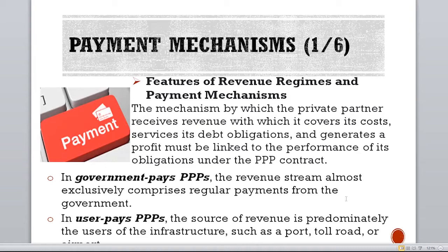That might be feasible because the government as of now does not have the 20 billion to put. So if government rather would achieve that project by putting an annual 1.3 billion, it frees up the remaining 18.7 billion that government would have staked. And they'll be using that 18.7 billion to do other things, education, sports, healthcare and all of those. So that's the beauty of PPP. Government saves itself the burden of incurring a huge cost that would deny it of performing other duties it could have performed within its lean revenue scope. And so paying in a staggered way over a period of time will yet achieve the value of the project that needs to be done now, not deferring it because there is not enough money.